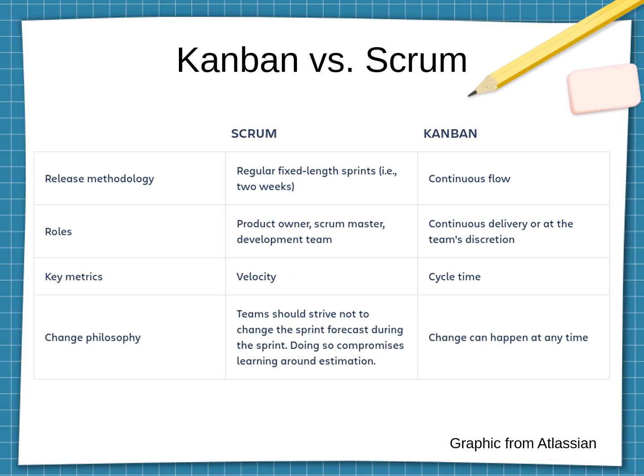Additionally, as mentioned before, Kanban isn't as concerned with roles other than how it makes sense for the team to split themselves up. It's not as strict as Scrum, with the Scrum Master and Production Owner being more defined as separate from the development team. Again, Kanban cares about the cycle time, so the time between the commitment point and the delivery point. When did we start and when did we end? With Scrum, the start and end point will more or less be known as the length of the sprint. So it is more concerned with the overall speed in which the project gets done.